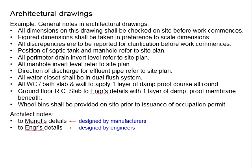When you notice mistakes halfway through construction, amendments will be rather challenging and will normally incur additional costs, which may also result in design changes along the pipeline. This can bring impacts to the engineers as well as the quantity surveyors. Therefore, it is stated clearly that everyone should check dimensions first and ensure there are no errors before site work starts.